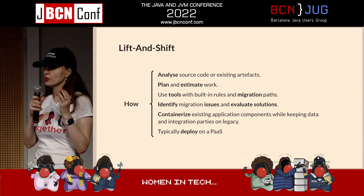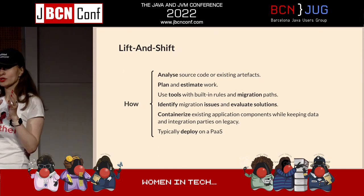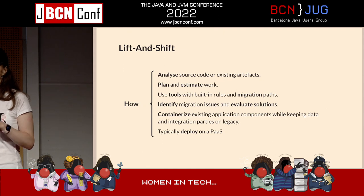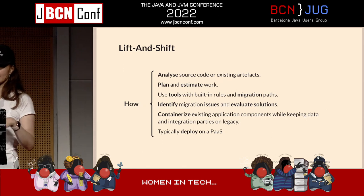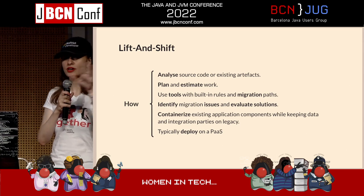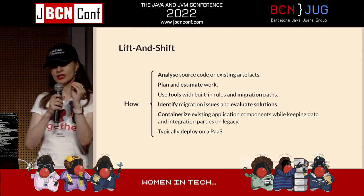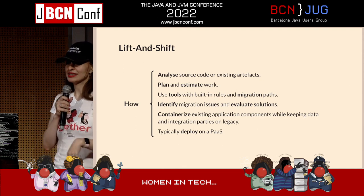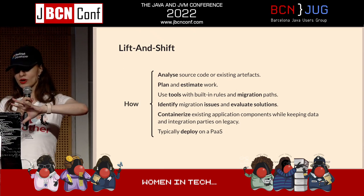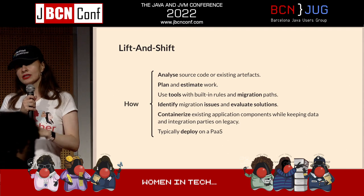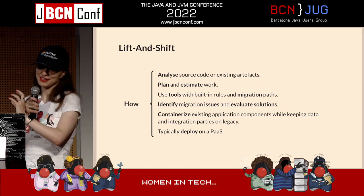Regarding lift and shift, how do you do it properly? First, analyze the source code or existing artifacts of what you've built. Second, plan and estimate the work — at least a high-level plan. There are a lot of tools that can help you with built-in rules and migration paths. They're not going to be perfect, but you can identify migration issues based on your experience and evaluate the solutions. Then think about containerizing your existing application components while keeping data and integration points on the legacy side. Do not move everything at once — try to do it gradually. Typically lift and shift is going to involve a platform as a service.